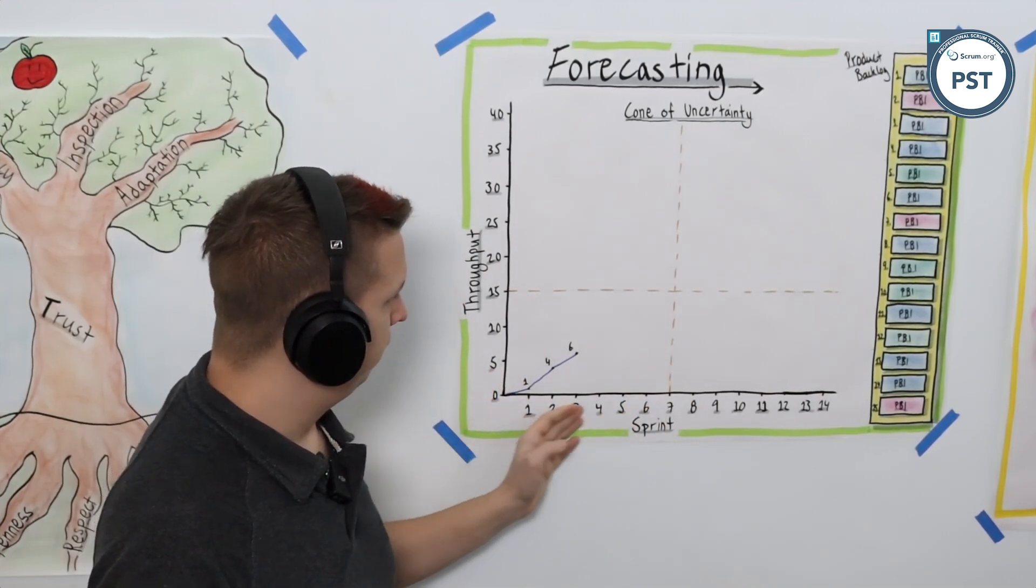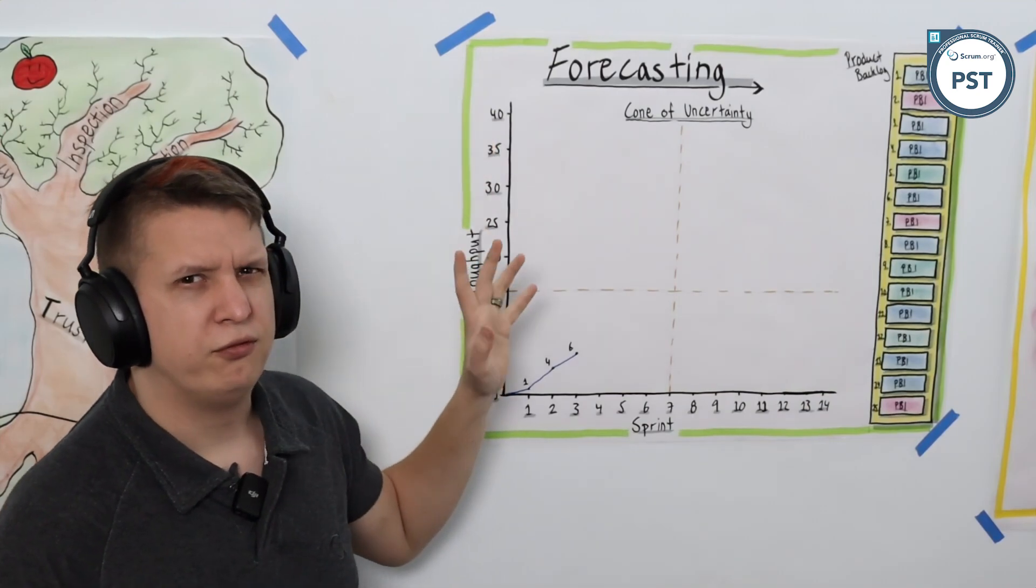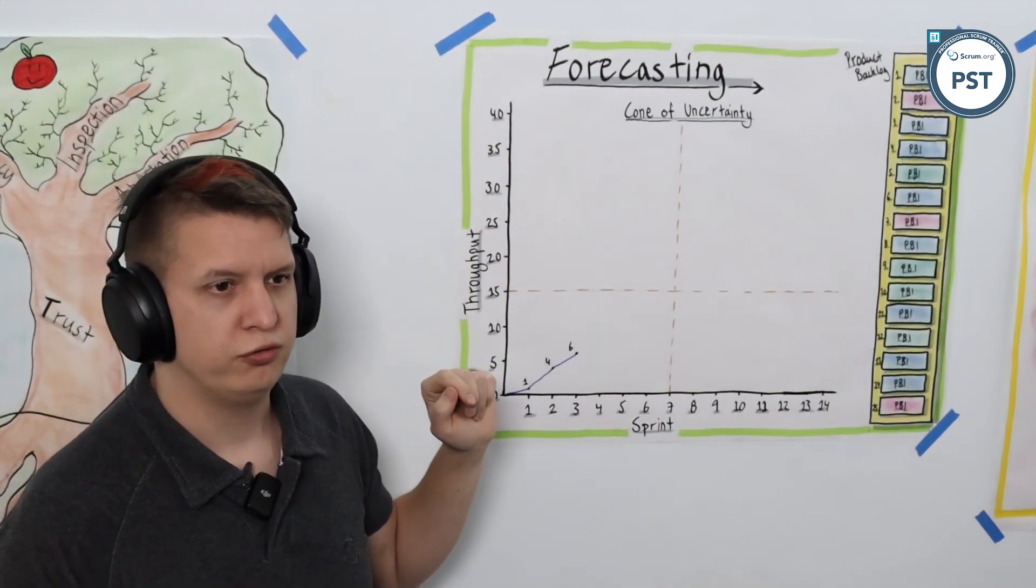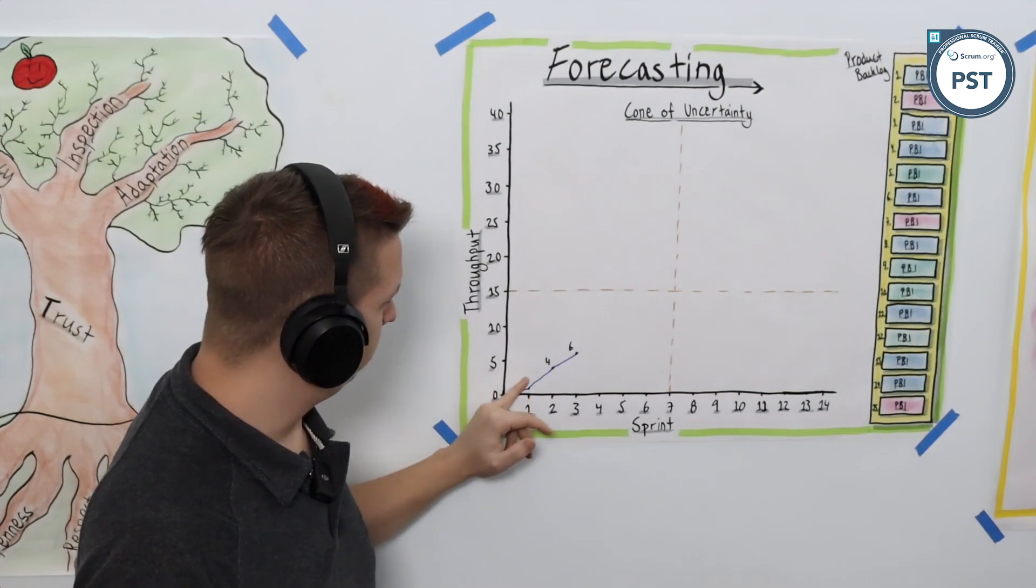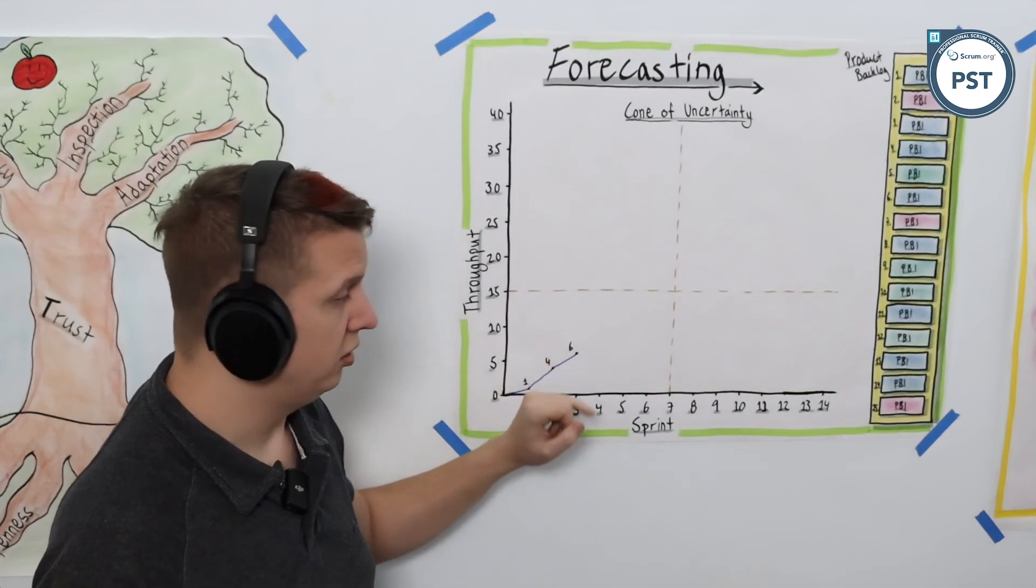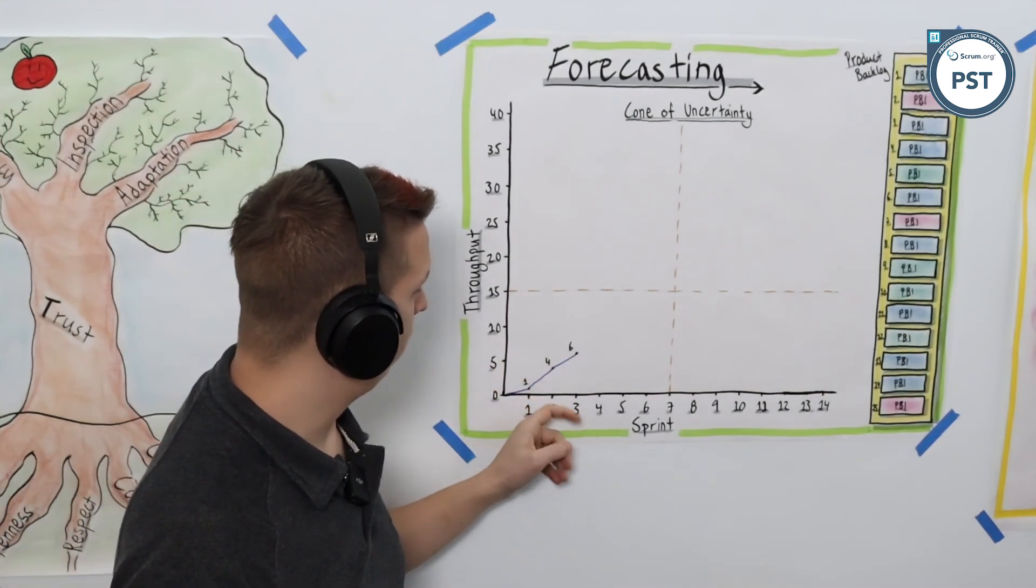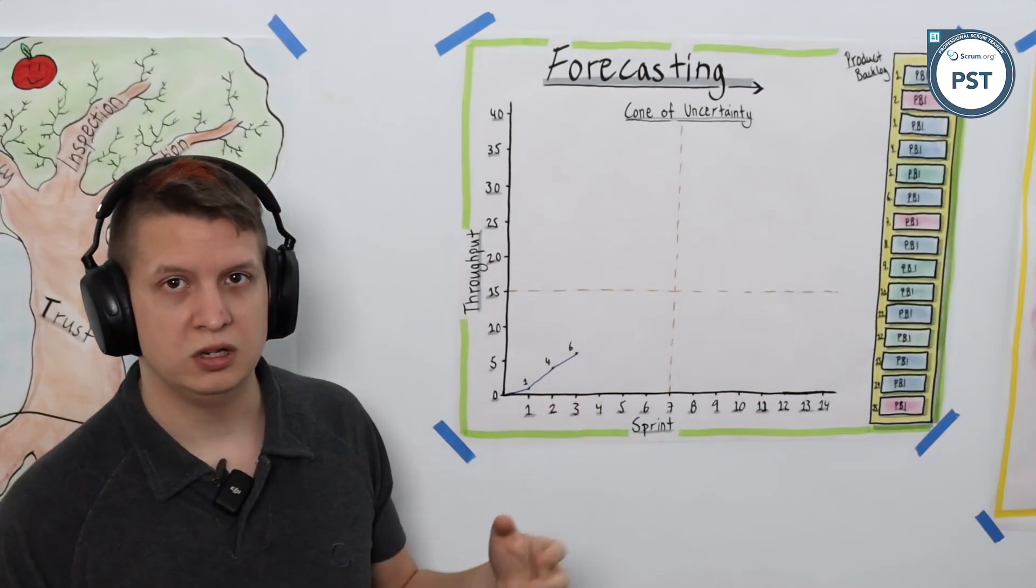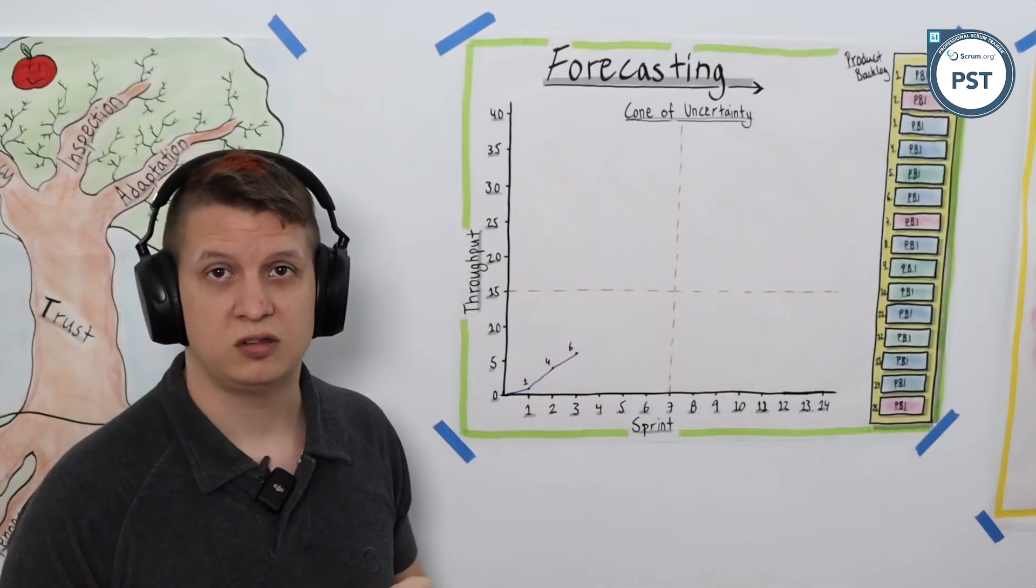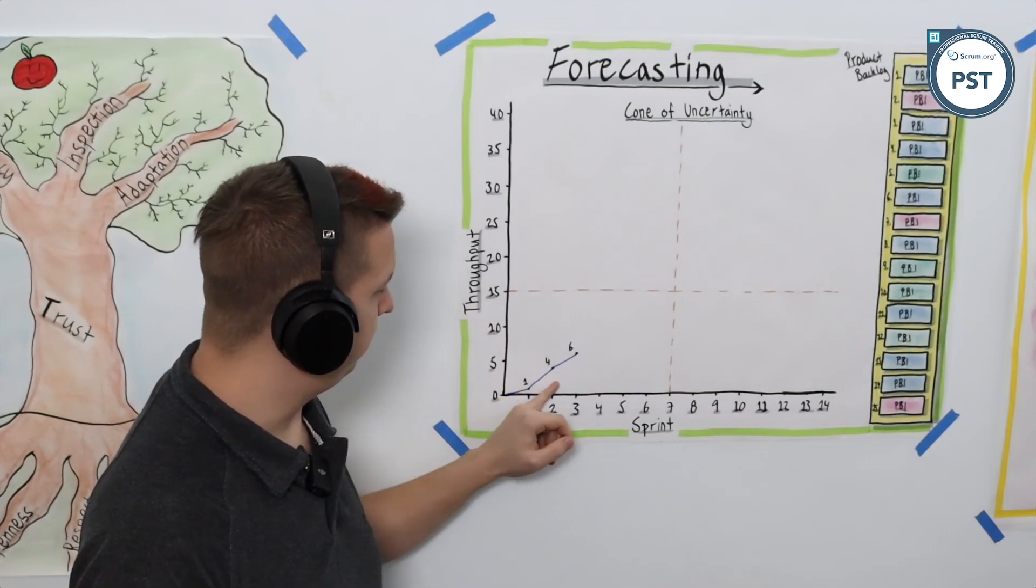We have 14 sprints and a total product backlog of about 40 items. In our first sprint we got one item done, so our throughput was one. In the second sprint we got three items done, so our cumulative throughput is now four. In the third sprint we got two done, so our cumulative throughput is now six.